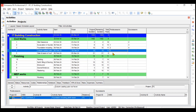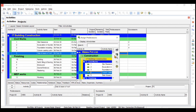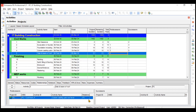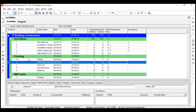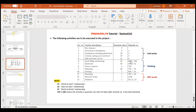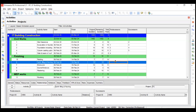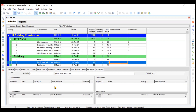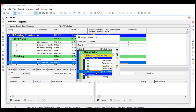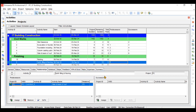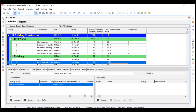For the fifth activity, we have the predecessor which is your fourth activity — click on it and click close. By default it is a finish-to-start, as mentioned. Now for the sixth activity, you have a predecessor which is your fifth activity, with an FS relationship and a 10-day lag. We'll assign the predecessor as the fifth one, click assign, and assign the lag also — lag is 10 days, so we type 10. Now the lag has been set to 10 days.